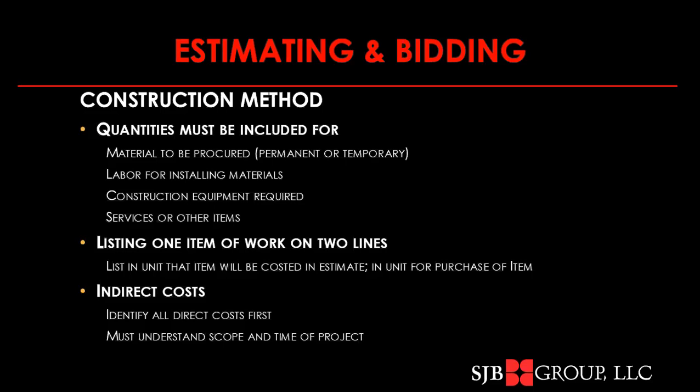And we're going to have to identify our indirect costs after we've identified all of our direct costs. The direct costs are going to have a big impact on time, and indirect costs tend to be very sensitive, tend to be time driven. And also the way you may approach doing the direct work may dictate the amount of support, additional indirect cost it takes to be able to do that.